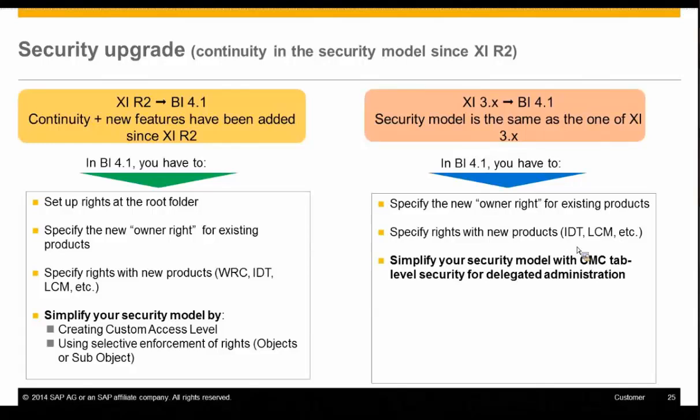It's a highly debated topic, and it's not easy to deal with security discussions. So just make sure you understand this. Evaluate and review the new enhancements in 4.1, compare them with your R2 or 3.1 security model, document the changes, plan carefully for moving the objects, and then redefine your security in 4.1.